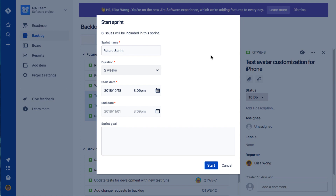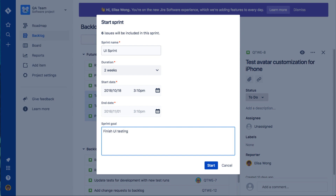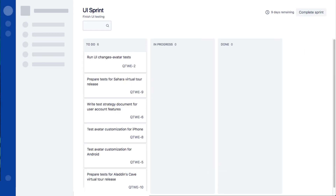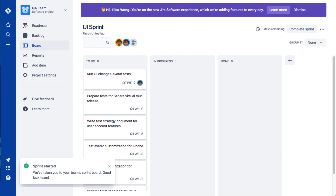Click Start Sprint to finalize your sprint information and get going. In the Start Sprint window, type a name for your sprint — you may have one set automatically that reflects your project key and sprint one. Next, set the duration. For example, we're going to use the standard of two weeks for the QA team sprint. Then set your start and end date for the sprint. You can update your end date from the automatic one given based on your sprint duration if you'd like. Lastly, if you choose, set a sprint goal and then click Start. When you start your sprint, you can start working from your project board to transition issues and manage the tasks your team needs to complete.